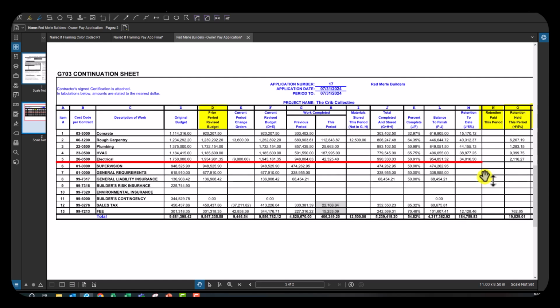Now you might be thinking, what is that giant red line going through this pay application? The giant red line going through the pay application is what we call the line. So things that are above the line are our direct costs for the project, your concrete, carpentry, plumbing, things that are directly used to build the project and stay with the building permanently. Things that are not direct to the project and do not stay with the building are below the line. So that's something like your supervision for your general contractor. Technically, your general contractor does not build the building, they manage the people who do. So they are below the line for the supervision. So when you are submitting your pay application as the general contractor, this is where your portion goes before you give it to the owner.